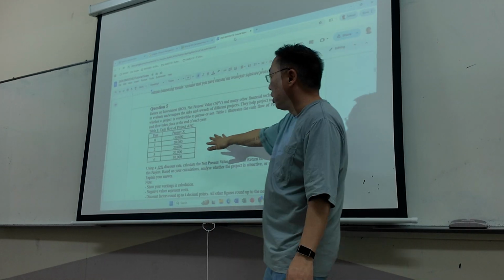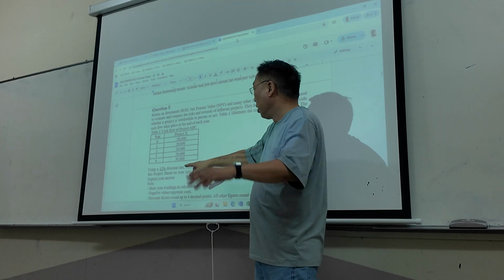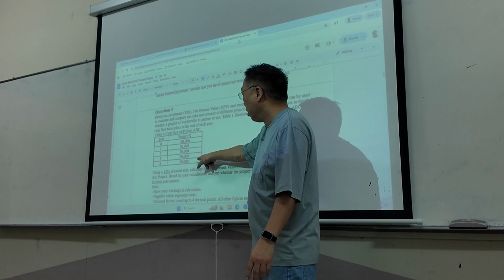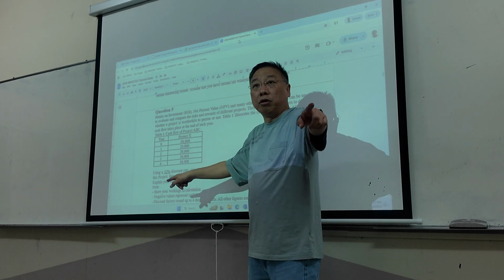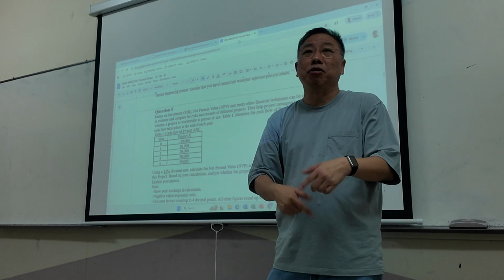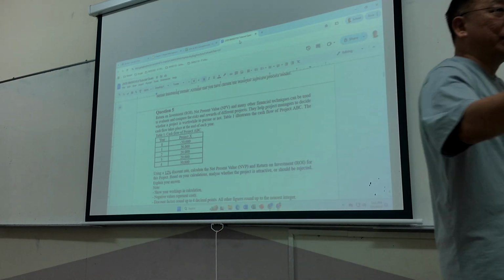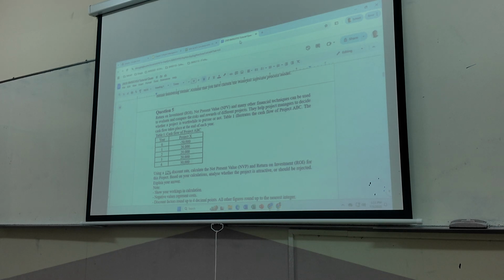But this calculation doesn't take into account the value of money 4 years down the road. They assume that 30,000 4 years down the road is the same as $30,000 today. Cannot be, right? The value is probably lesser down the road. So we have to use NPV to calculate it.